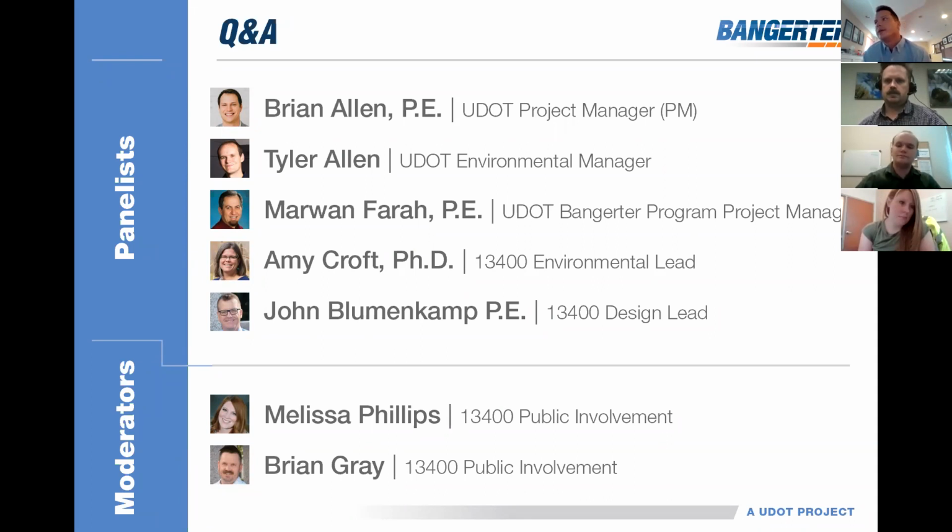When we take Bangerter under a side street, it becomes necessary to close the east-west movements due to safety concerns. Also, it allows for the intersection to be built much quicker. It's kind of a rip the Band-Aid off approach, and it's also a balance between costs and impacts. So we're consistently trying to optimize that.